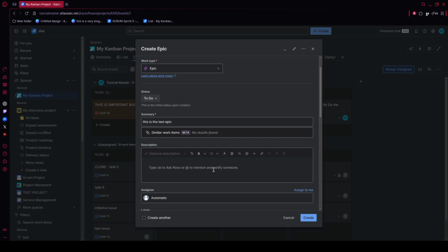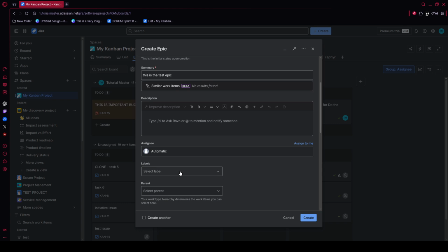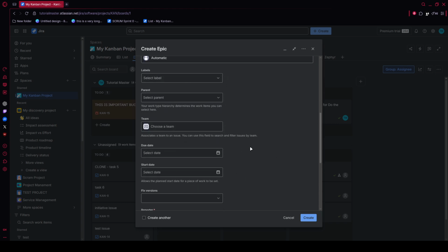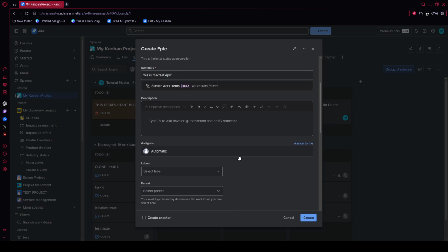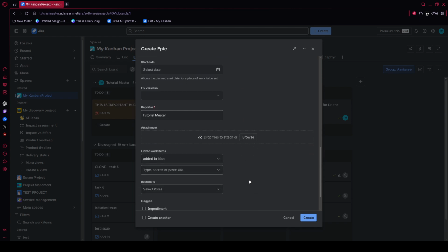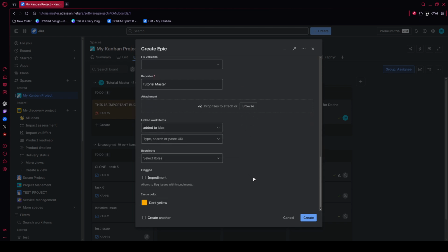Once the issue has been created, open it and improve the description by turning it into a practical definition of done. Instead of writing long paragraphs, add a simple checklist in Markdown format. For example, include items for code being compiled and peer-reviewed, automation tests passing, and cross-browser UI validation being checked. This makes expectations visible at a glance and reduces confusion during implementation.